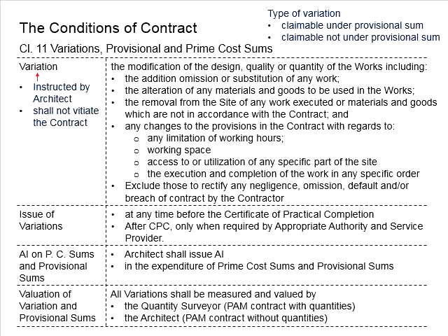Should the instructions be given by the architect verbally, the contractor will need to follow up with the confirmation of architect instructions, CAI. This is to place a record that the relevant work which can result in the variations is actually the instructions by the architect.